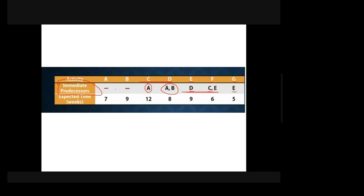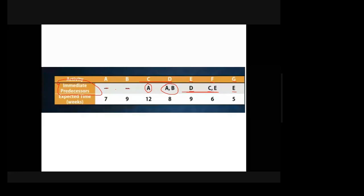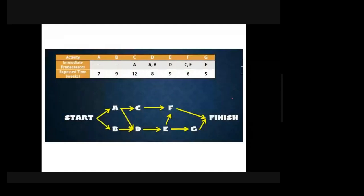Once interdependency is noted, you also need to calculate the time. Not all activities have similar times; each activity is unique and may require different amounts of finishing time. Therefore one has to consider all of this while working with network diagrams. We have written down in detail the time required for activity A, B, C, and so on through activity G. A table can only help you so much — you need a proper network diagram to illustrate the interdependencies and connect them with start and finish points.